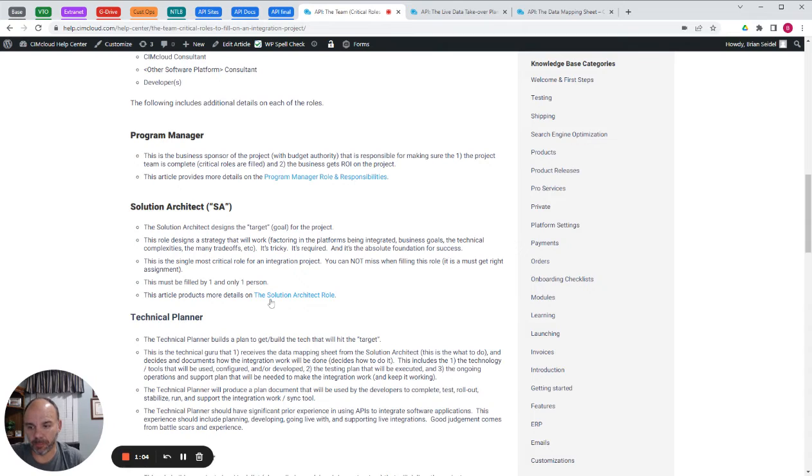This is the overall business sponsor. This person has ROI responsibility for the project. They typically have budget authority. It's typically, in smaller businesses, a C-level executive, or maybe a VP level. But this is a business person that's green lighting the project and making sure that the proper team is assembled. This role is accountable for making sure these other roles are filled.